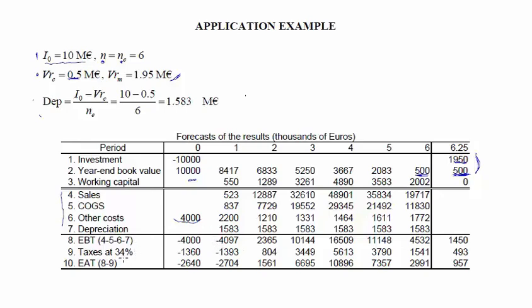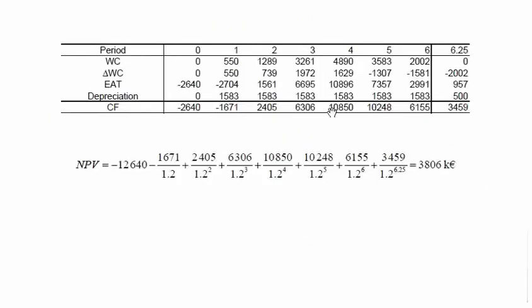And we evaluate taxes, of course, assuming a tax rate, which in this case is 34%. So line number 9 is just obtained from line number 8, multiplying by this rate. Okay, and then we have the earnings after taxes. We just need to subtract line 9 from line 8, and we obtain these results. Now, in this table, we illustrate the calculation of the free cash flow.